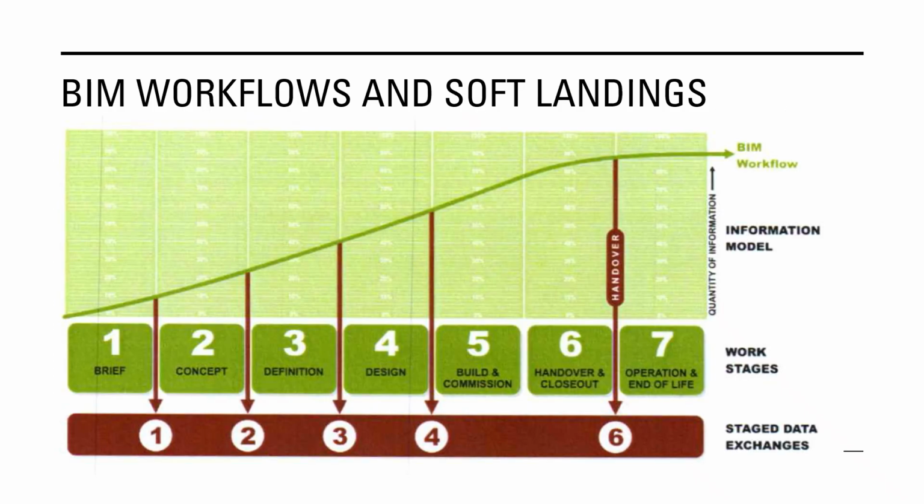BIM workflow and soft landings. This diagram illustrates the BIM workflow across the full life cycle of a project, from initial brief to end-of-life operations. As we move through each stage, brief, concept, definition, design, build, handover, and operation, the quantity of information increases. BIM ensures that this data is structured, coordinated, and progressively refined.